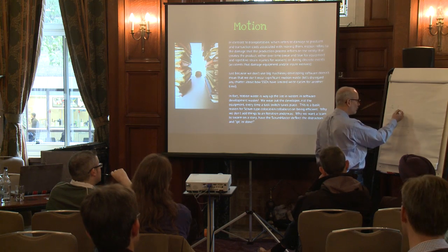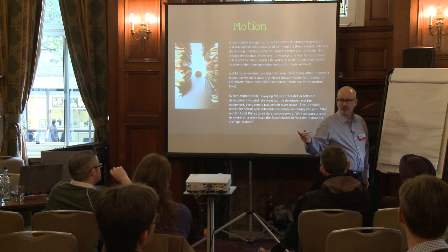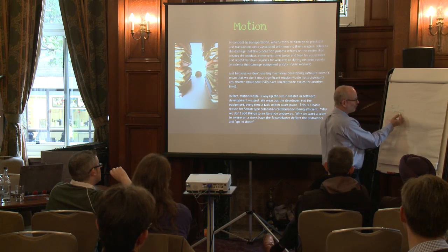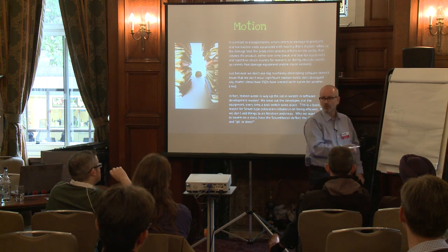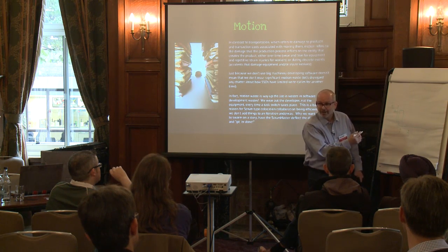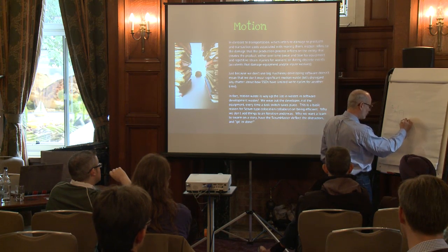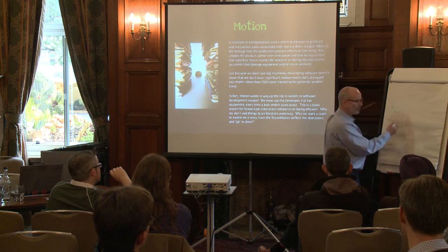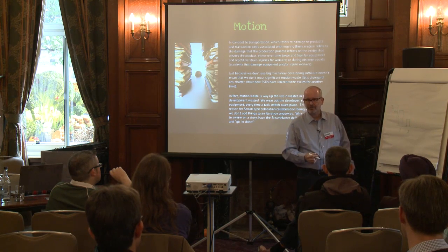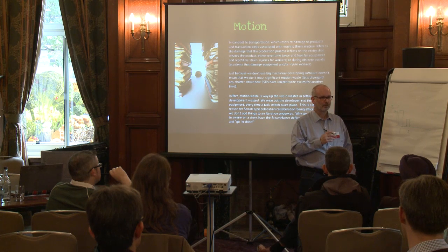Jerry Weinberg looks at the problem and says, well, if you're working on two projects at once, one would think that your efficiency would be half of what you would normally have for one project, in this case around 40%. Well, it's not, right? And I'm not going to give you the exact number because I don't recall, but it was somewhere around 20%, something like that. Where'd the rest of the time go?